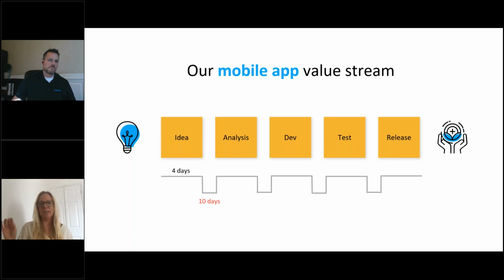And when I say outside of scope, one of the things you can do as the person leading this exercise is create a charter or a scope document that says, this is what we're going to be talking about. This is our value stream. This is who's in the room. This is what we're going to be doing. These are the challenges. This is what we're not going to talk about. So we're not going to talk about that particularly painful integration with that third party that we know we can't influence, for example. You might take something like that completely off the table.